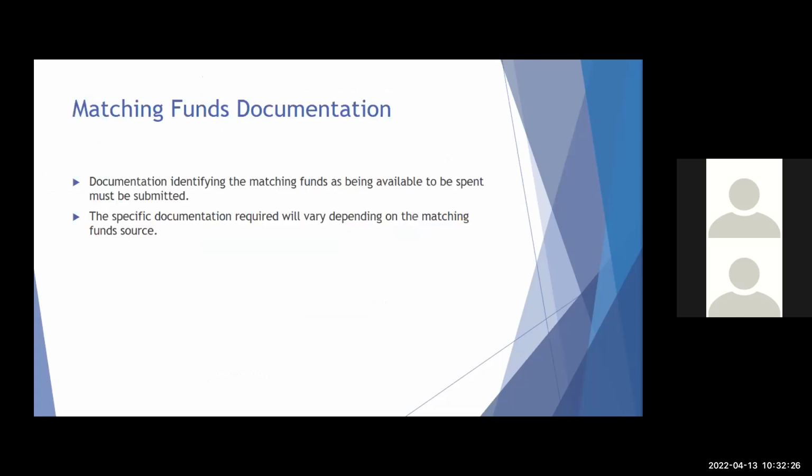For matching funds documentation, if you did not receive a waiver and you are required to provide matching funds and you have committed to provide matching funds, then you must provide documentation identifying the matching funds as being available to be spent. That means that you could spend these funds tomorrow, not that you still have to go through some steps to get the funds.